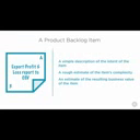The Scrum framework requires that each product backlog item be assigned a value, which can be useful when prioritizing when the team should invest in delivering that item and help illustrate the business value that's being created by the development team. Now, there is no prescribed way of measuring this value, but what I've seen work well in the past is to simply assign each item a letter value of A, B, or C.